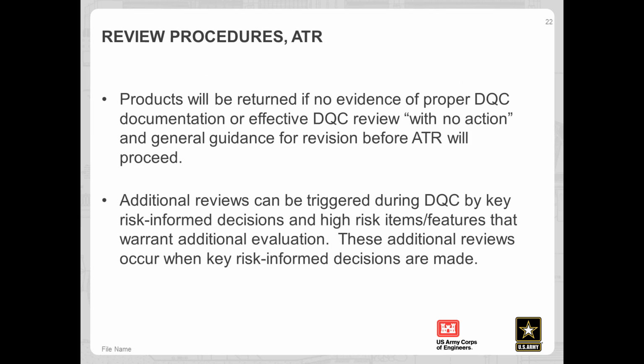There's also some requirements, as Karen stated, for having certified reviewers. Again, the bottom line is we're trying to get everything DQC'd. So if the ATR team doesn't see any evidence that DQC was appropriate and effective, that it happened, they're to return it to the PDT with no action. So again, that's back to our bottom line up front. Everything's going to be checked. And another point is whenever there's a key decision to be made, you bring in your ATR team.